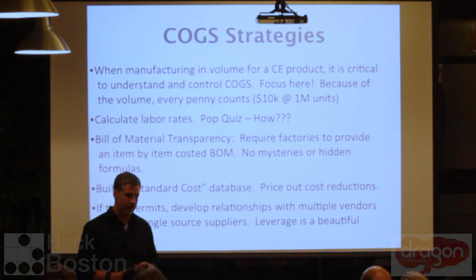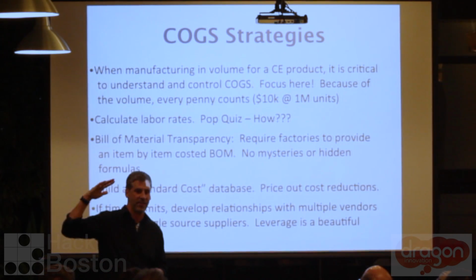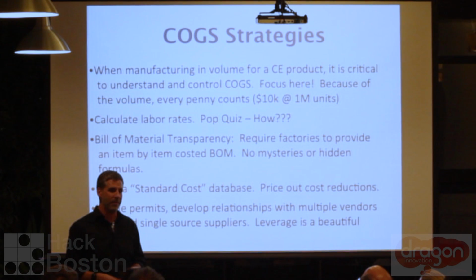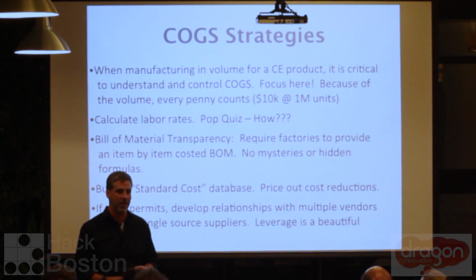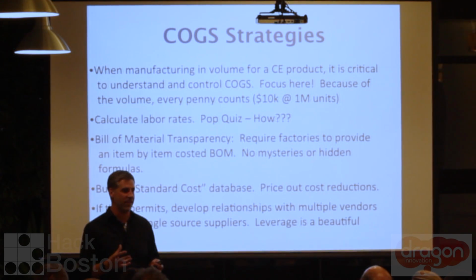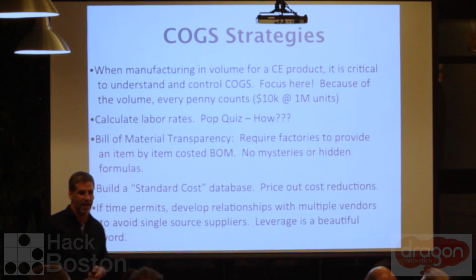Typically for more expensive components, you might want to consider consigning it because you'll get a lower margin. We talked about the standard margin, the special margin. The consigned margin is even lower because your argument there is it's not tying up their cash flow and it's not taking their cycles. So you can look at it. My recommendation is only consign one part because the factory does this for a living. And the problem is if you, like most of us, or many people don't do this for a living, and if you try to save money and consign everything, chances are you're not going to order one of the key ingredients, and if you don't have the ingredient, the product's not going to be built. So to save a little bit of money, you've shot yourself in the foot. So it's just that one component to control the IP. It's a great question, though. And as you get a bigger team and scale, you can dive into different strategies.